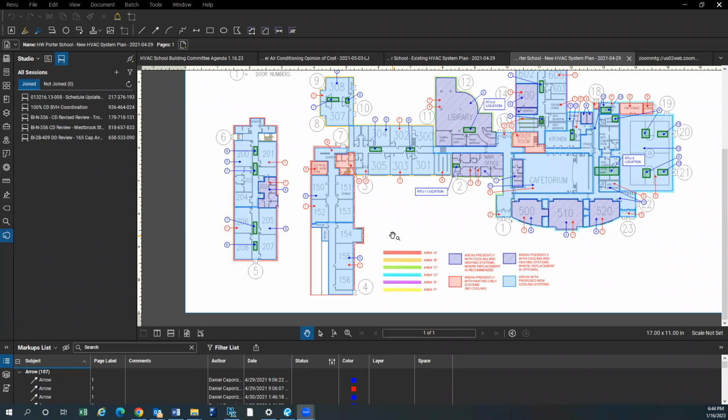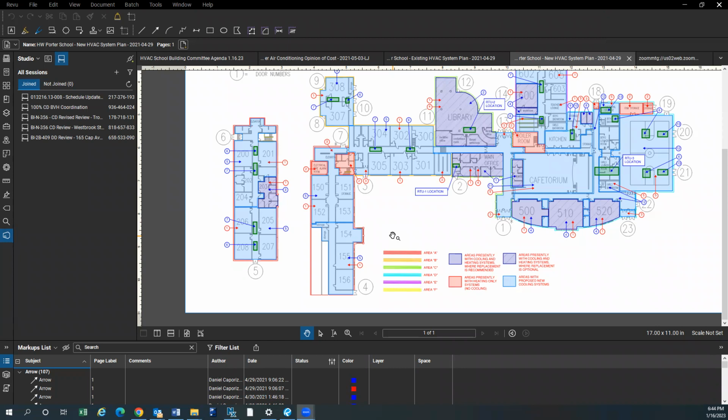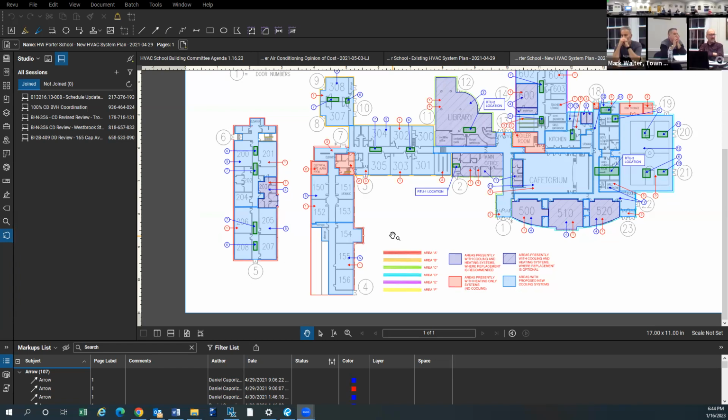But let's put it this way. I would not feel comfortable if you hired me to write the RFP and then turn around and bid on that same RFP. Right, that's the problem. It has to pass. And we're constrained in time. Yeah. So Mike, we'd have to talk on that offline on how to get that spec written. Because what we don't want is whoever writes the spec to actually, the key is whoever does the construction, we don't want them writing the spec.